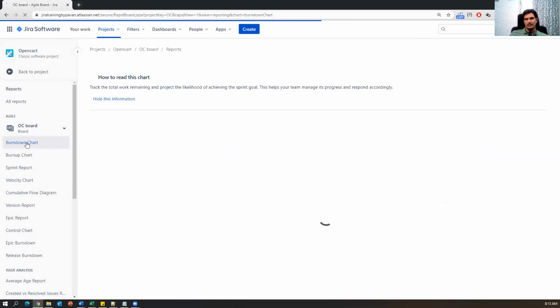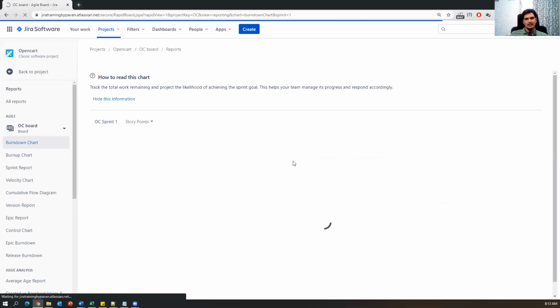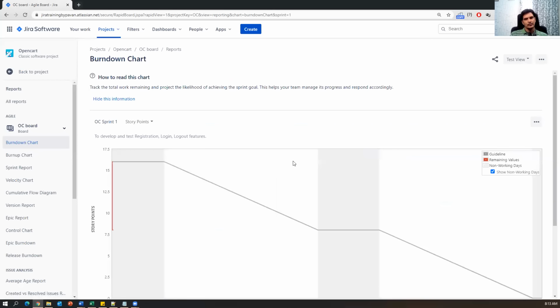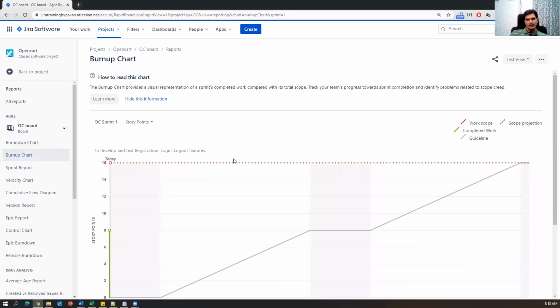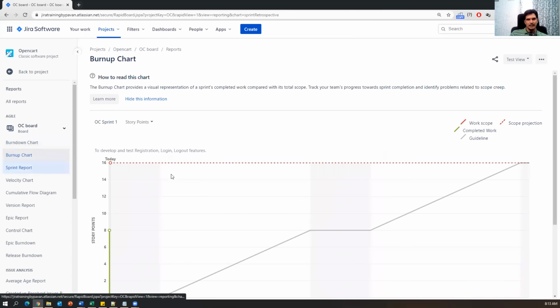The main information displayed is how much we have planned, how much we have completed, and how much is still pending. How many story points we have given, and how many story points we have spent on a particular story. Those details will be displayed in the burn down charts, at every story level and task level.